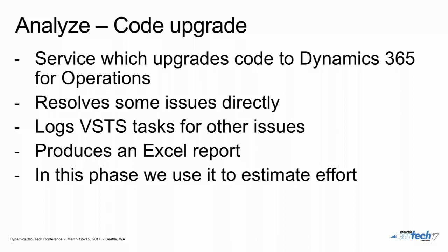And for my personal preference, I believe in that approach. I don't believe that we'll get to a place where we're able to actually estimate the effort, because it's too subjective. We can know that a line in a class conflicts, or that 5 lines in a class conflict, but we don't know what that means. The code upgrade tool is like a robot, you know. It just knows that 5 lines conflict. It doesn't know that that means, oh, actually, you can just delete it and it will all work fine then. They've been superseded. Or this whole big feature needs to be rewritten, or, you know, whatever. Could be any number of outcomes for that. So someone with knowledge of the customer's code needs to look at the report.